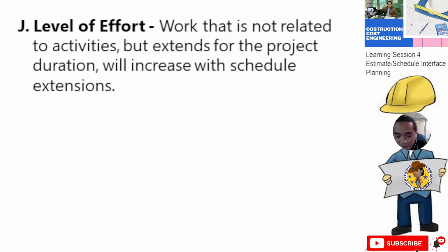Next is level of effort. This is the last slide that we have in learning session 4. Work that is not related to activities but extends for the project duration will increase schedule extensions. So those are the reasons that some projects are over budget or are delayed.